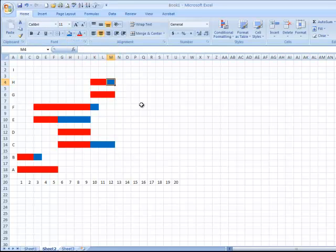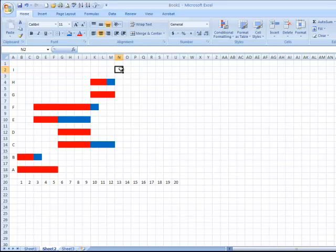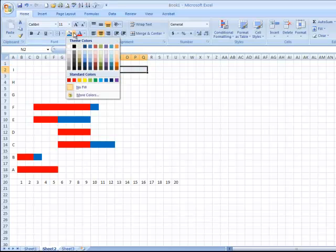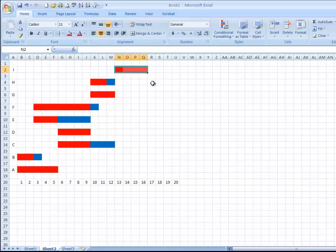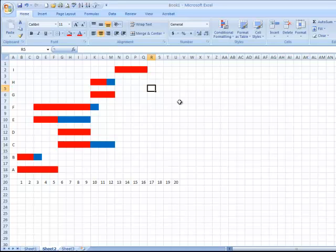Lastly, let's look at activity G: G starts by the end of day nine, takes three days, and has no slack. Activity H starts by the end of day nine, takes two days, and has one day of slack. Activity I starts by the end of day twelve, takes four days, and has no slack. And this is a basic and simple version of the Gantt chart for our previous CPM example.